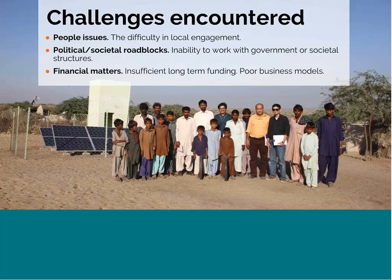The challenges we encountered were three-fold. First, issues with people — difficulty in getting local engagement, solved when we connected with the right community partner, a local NGO with good trust and the same language as the local community. Second, political and societal roadblocks — we got a memorandum of understanding signed with the local union council representative, and initial friction was solved when their government representative came on board. Finally, financial challenges — we were unsure of long-term funding and whether we would get the right business model.